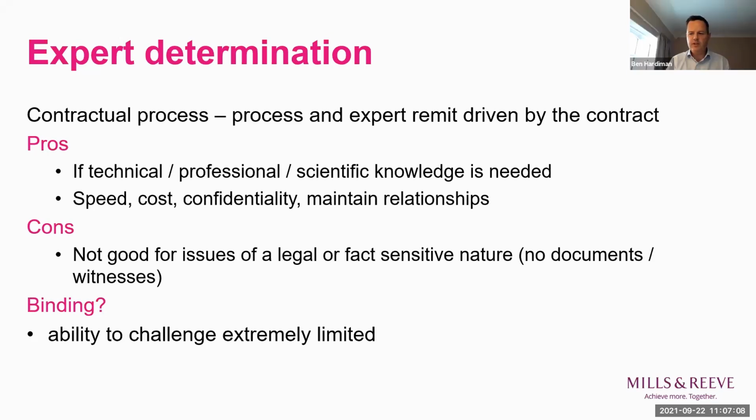Well, it can't be enforced without court action. So the mechanism is that the decision becomes part of the contract. So if there is a failure to comply with that decision, that amounts to a breach of contract. That means you have to go through the courts to enforce it.